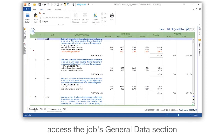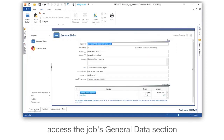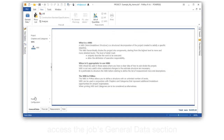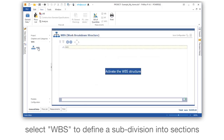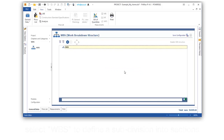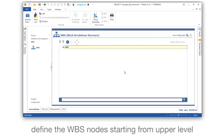Access the job's general data section. Select WBS to define a subdivision in two sections. Define the WBS node starting from the upper level.